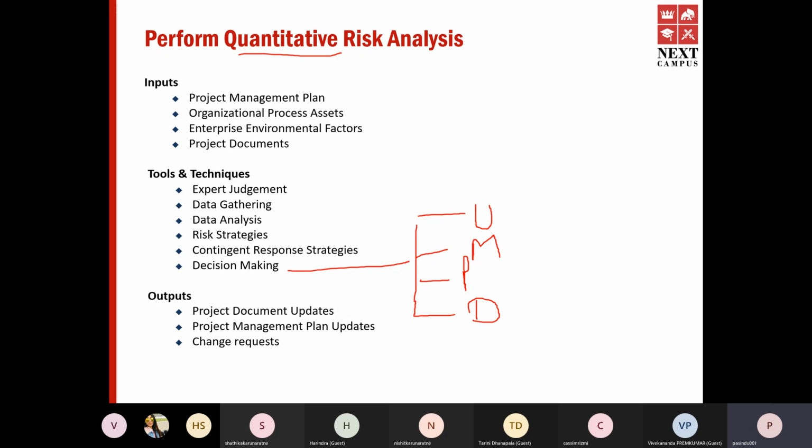With those risks, you have response planning. You might say, okay, I'm going to give a training on this new technology for all my team. And the timeline is tight, so I'm going to add more resources so that I can manage the timeline. So you have response strategies at the beginning. Correct, Prem? Yes, understand. Now, during the project also, you might get to know new risks.